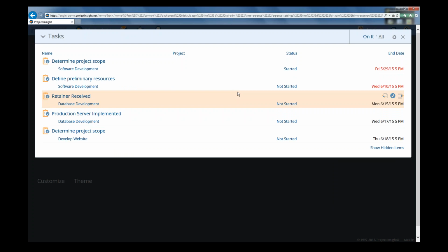So you're going to update the task status and enter time as the task is being worked on. Now in some cases, like if you have a short duration task, such as 4 hours or 1 day, you may just go directly from not started to finished or done. And that's kind of normal in those shorter duration type tasks. But when you have a longer duration task, you definitely want to be keeping this updated, like I said, as you do the work or as you finish doing a piece of the work or at the end of the day. And again, that's important for your project managers to know how the work is progressing.